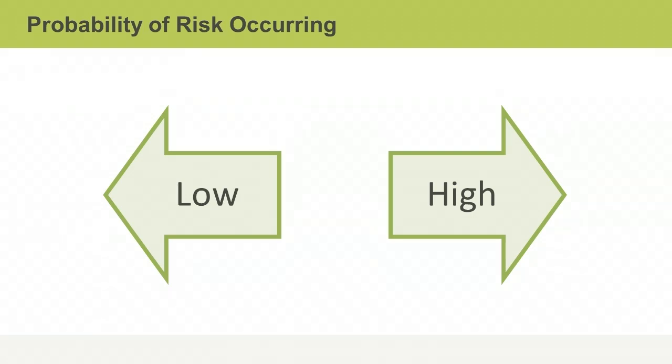For example, if a risk event causes the budget to go over by 10%, will you consider the impact low or moderate? And what is the threshold between moderate and high impact? The answers to these questions form the definition of impact for your project. It is helpful to develop a system among team members where you assign a numerical value, such as a percentage, to what you mean by low or high. This ensures all team members are consistent when communicating about risk.